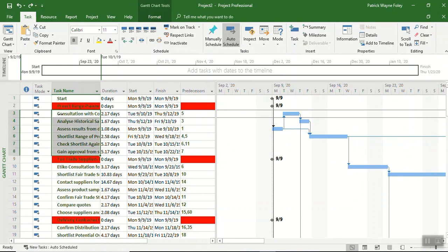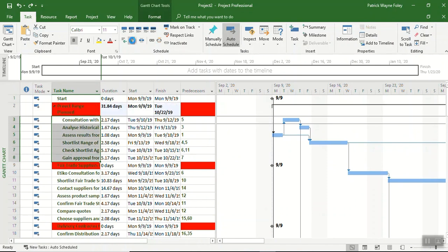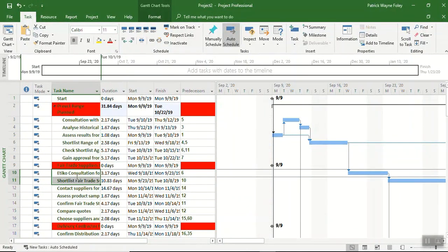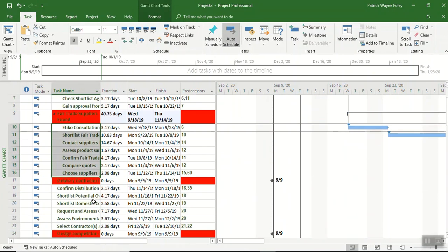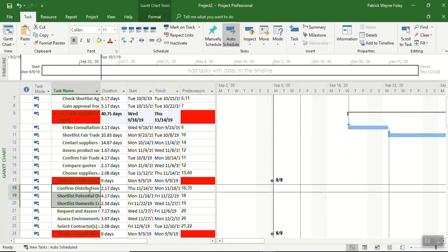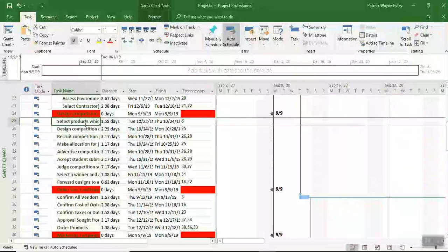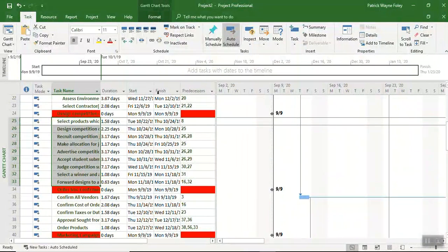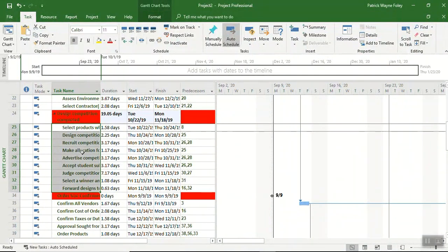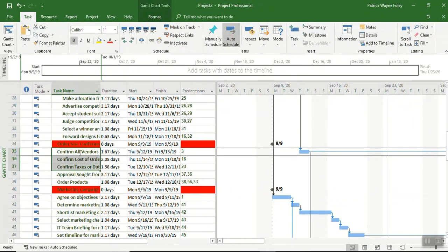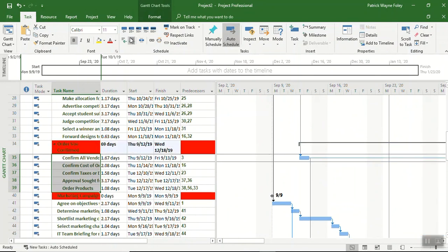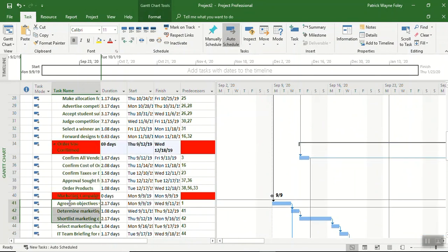So first of all, we select a group. We then go up and we make each of these indented. We indent the tasks. This just adds clarity to the layout. Also allows us to make these summary tasks where we can either expand or compress these when we're looking at it. This can be useful later when we're preparing our reports and we want to create a high order summary of how the project looks.